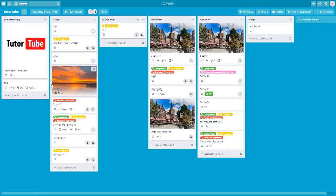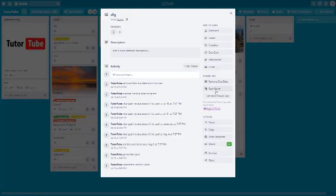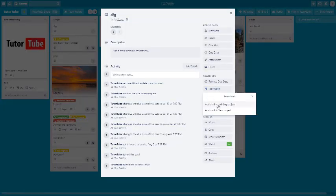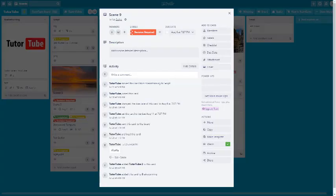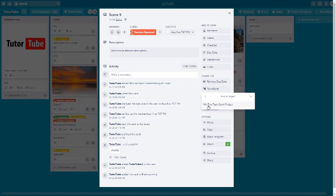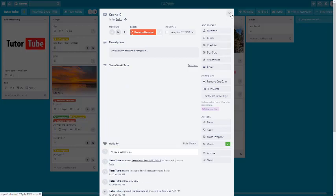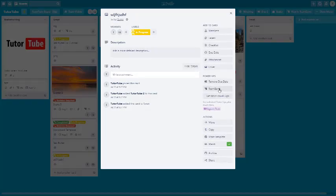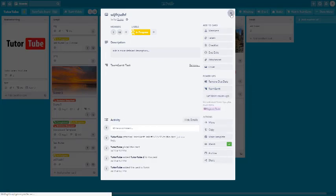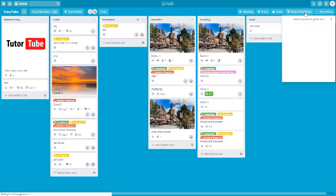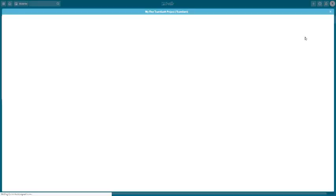Close this and assign a few other cards. Click on a card like 'Script,' add it to TeamGantt, and add the card to an existing project — 'My First TeamGantt.' It may seem tedious at first, so if you want to work with Gantt charts, add cards to TeamGantt as you create them — it's easier to manage later. Simply add a bunch of cards using TeamGantt, then go to 'View in TeamGantt' and arrange every task visually in the Gantt chart view.